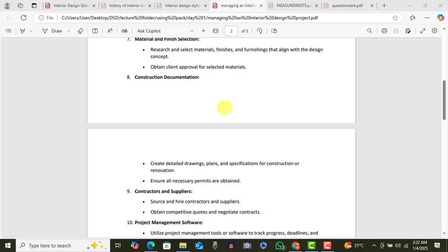Even if you have a background in construction, you won't just come and tell me to go and cut a door in the wall and I'll go and do it. No, I'll get a structural engineer to find out if this would compromise the building. Number two, you need to do an MEP analysis to find out, does any plumbing go through this wall? Does any electrical cable go through? Because the moment we begin to cut, we cut something, you create a problem. That is not your forte.